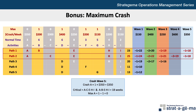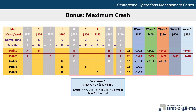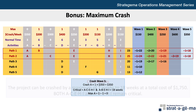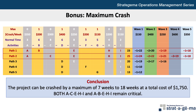Can we continue? Well, let's look at this very closely. We could crash activity B by one week, but that would only reduce the time on path 1 to 17 weeks, while path 2 would still be critical at 18 weeks, so we'd be wasting our money. As for paths 3, 4, and 5, they're all still below 18 weeks, so crashing activities there would not reduce the total project time. Therefore, the project can be crashed by a maximum of 7 weeks to 18 weeks at a total cost of $1,750, and both paths A-C-E-H-I and A-B-E-H-I remain critical.